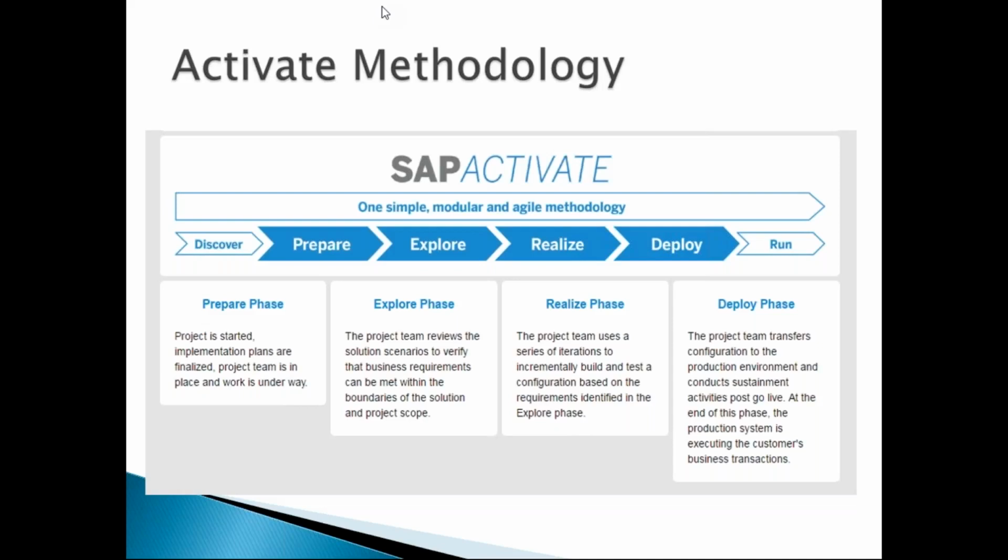That is a recommended approach SAP suggests every consultant to follow: make sure any changes on these signed-off processes are updated in the workbook, and take a latest sign off, sending the updated version again after IT1, after IT2, after IT3, iteration 1, 2, 3 like that. With the updated one we are required to take the sign off.